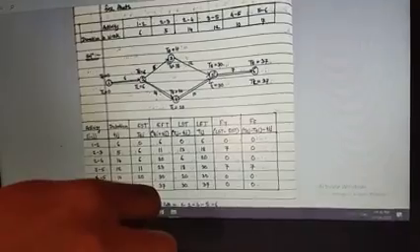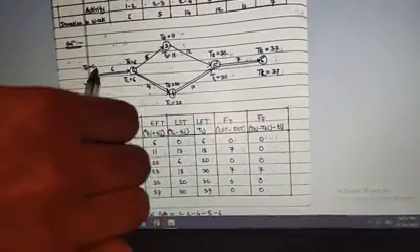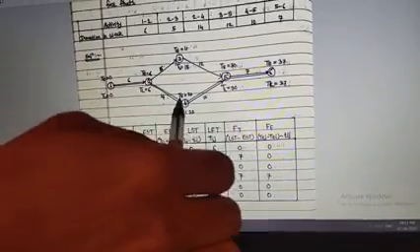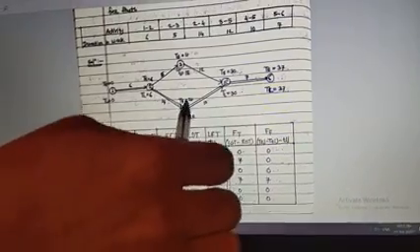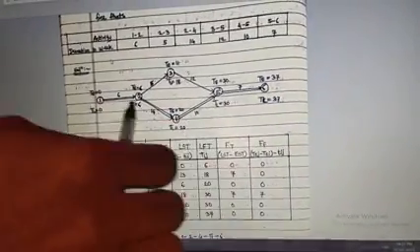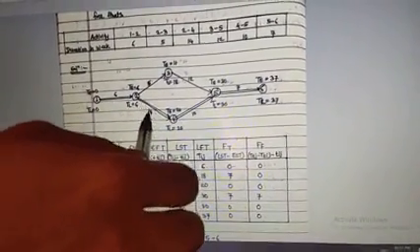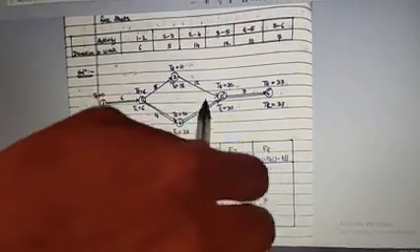So now let us go for the last one, that is 5th to 6th. For 5th to 6th, what I have written here is 30. So how has this 30 come? Again, it is very simple. First to second activity duration plus second to fourth activity duration plus fourth to fifth activity duration. 6 plus 14 is 20. 20 plus 10 is equal to 30.